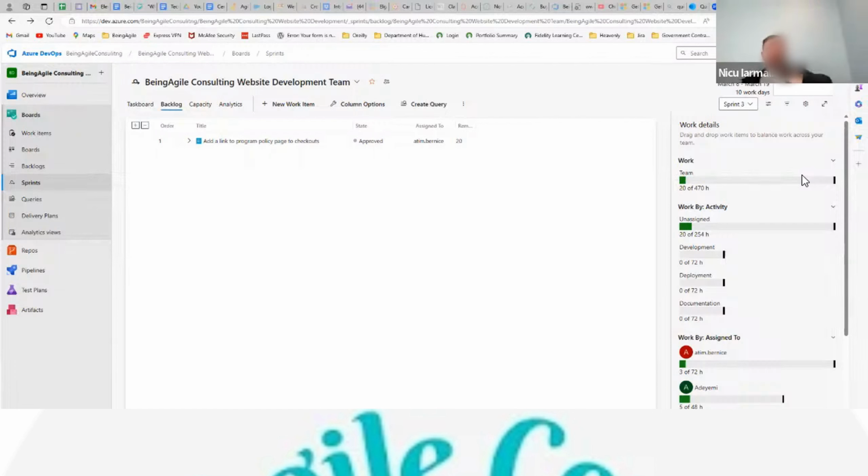I've worked with one team, they agreed at 20%. Some other team agreed at 15%. I've worked with another team that agreed at 10%. It really depends on the team and their reality and their specific circumstances. So they would fill it up until here, you see. And then this one that is empty is for any unforeseen circumstances that may happen in the course of the sprint.